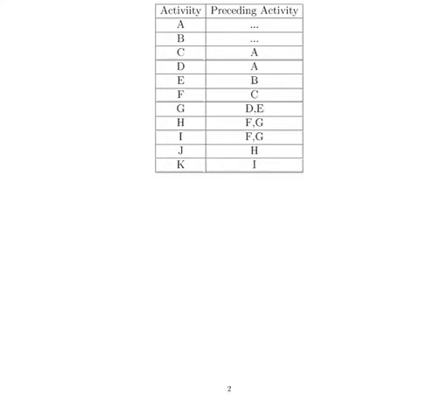So what I'm going to do is scroll down here, make a bit of room. We're going to start off with A and B. They have no predecessors, so they can start here at node 1. So that's activity A here, and this is activity B. And we can set up the nodes 2 and 3 now. So that's node 2, that's node 3.